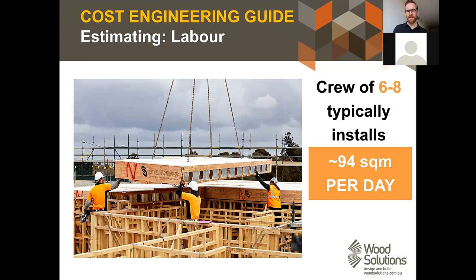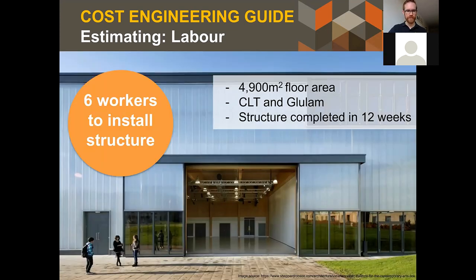All the structural work, I suppose, has been done off-site. This is just an installation process. So you'll typically find 6 to 8 people working on-site during the structural phase, which is quite incredible when you compare it to other projects.